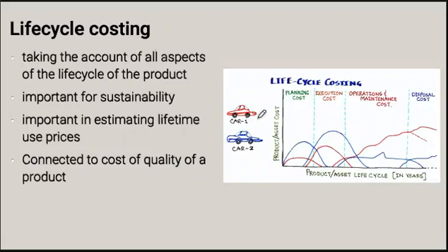Frequently increasing the quality of a product is exponentially more costly. To go from yields of 95% to yields of 97 might cost 3 to 5 or even more times as much as going from yield of 70 to 90, simply because the low-hanging fruit and the easy wins have all been picked and used to increase the yield and the quality of the product.